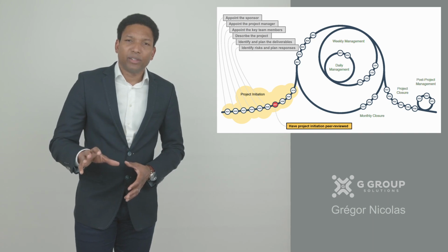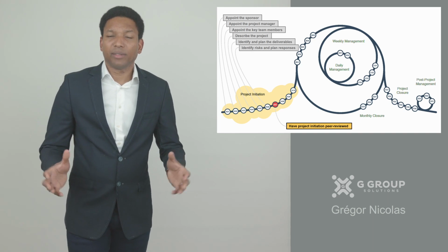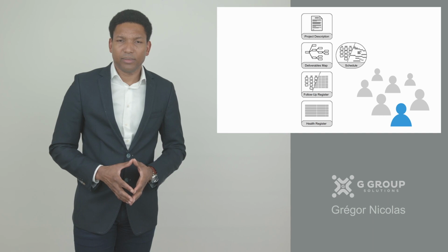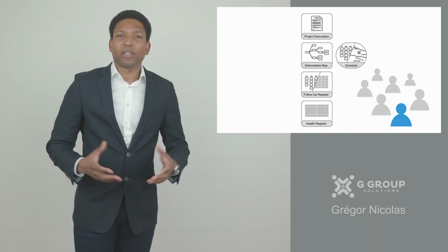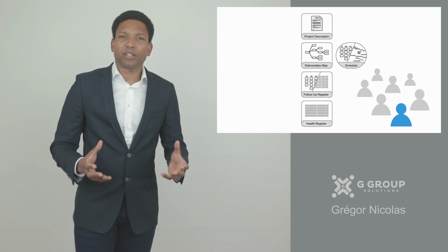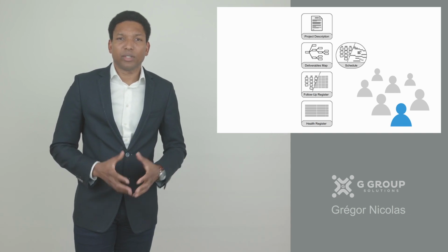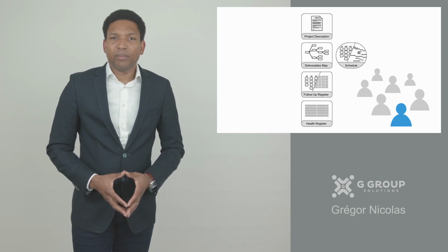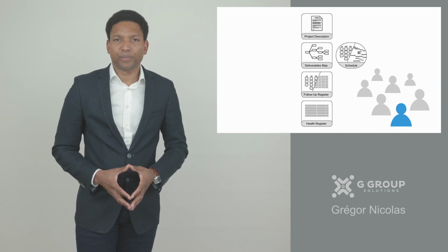Now, throughout the plan, you're creating different documents. For the project description, we talked about it. You have the main points. Why this project? The purpose. The benefit of this project. From the outcome, what you're expecting from it. The requirements of this project: what is required for this project to be considered successful. The stakeholders list for the initiation part, high level. The time and the budget or cost for a certain part of it.